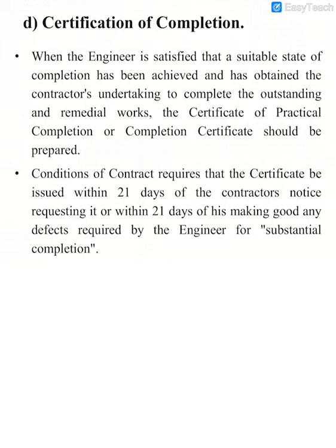Alright, certificate of completion again. When an engineer is satisfied that the suitable state of completion has been achieved, and has obtained the contractor's undertaking to complete the outstanding remedial work, the certificate of practical completion should be prepared. I did explain this one.